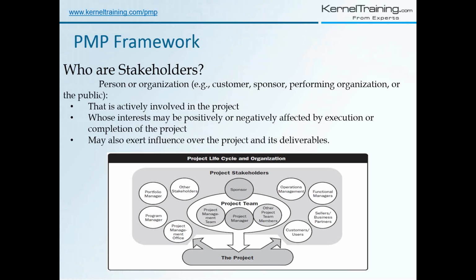So initially when you start with the project, you need to have a project charter first. That is, what is the SOW, what is the requirement, what is the need of the project. And then the first thing we do on the project is identify all the stakeholders. Very important. So all positive and negative stakeholders we identify on the project. Identify stakeholders is very important, and it is done in the initial stages of the project.